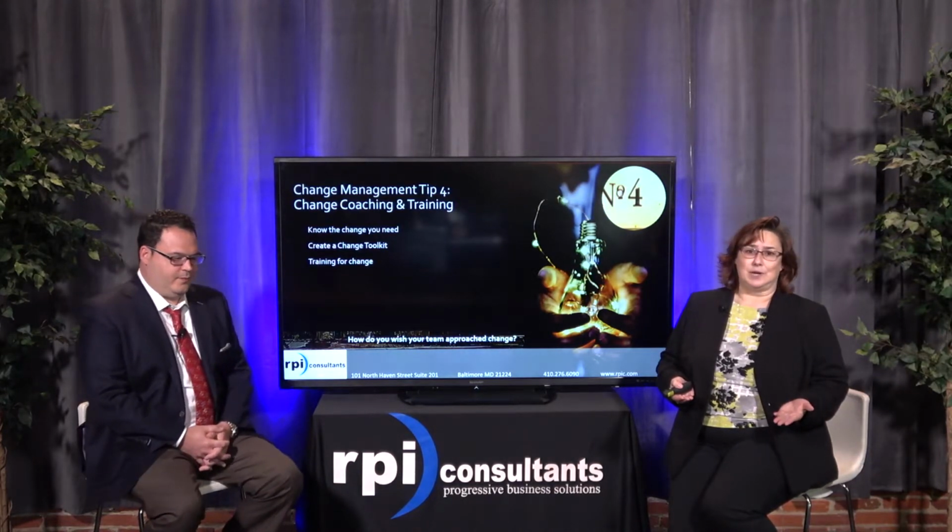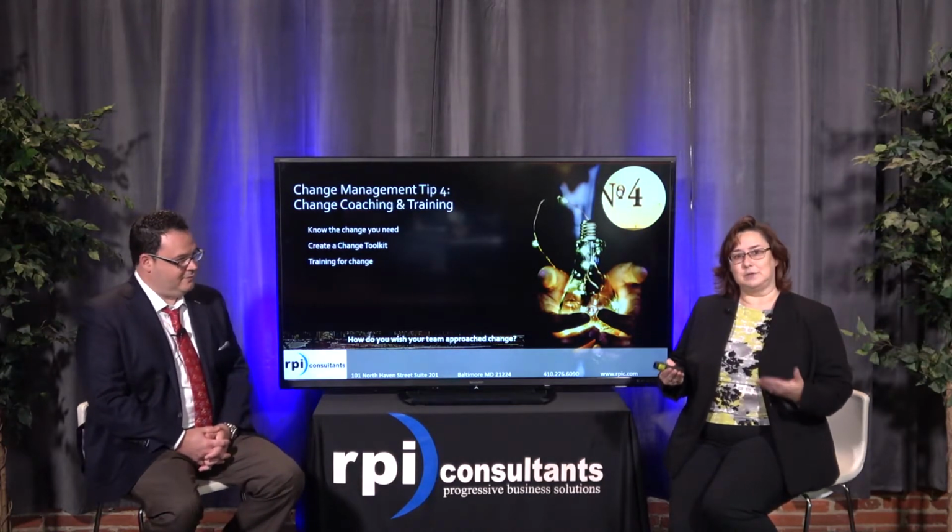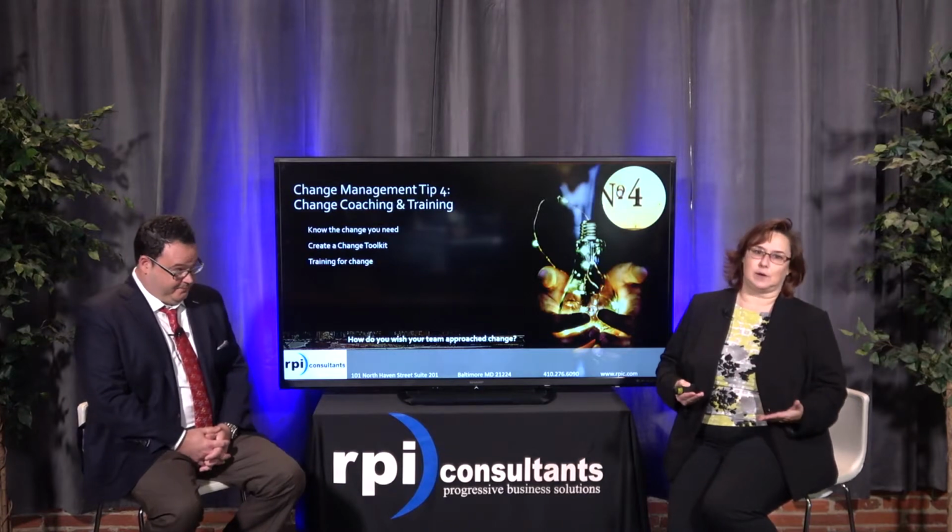If you skip over helping your team with some of those change-related skills, the problem is it can lead to a lower adoption rate in the software, and people start developing those workarounds. You can have the system in place, but they're off doing it manually. So you want to make sure you're addressing that with them and keeping them engaged throughout this whole project so that they really are on board. And we can customize change-related trainings so that if we're in your organization, we can find out what those teams need and meet them where they are.